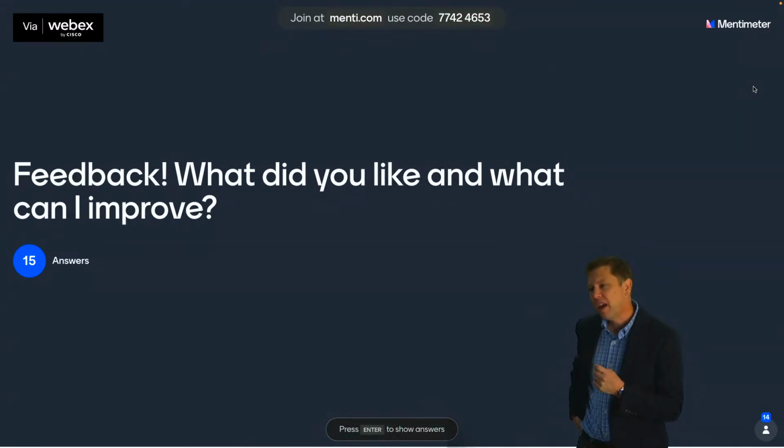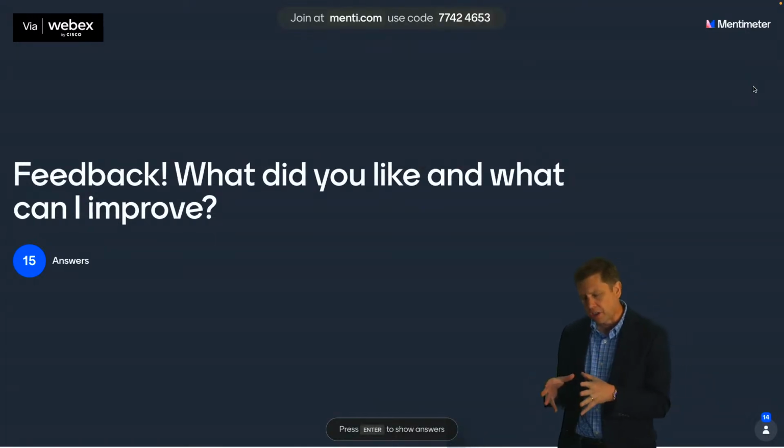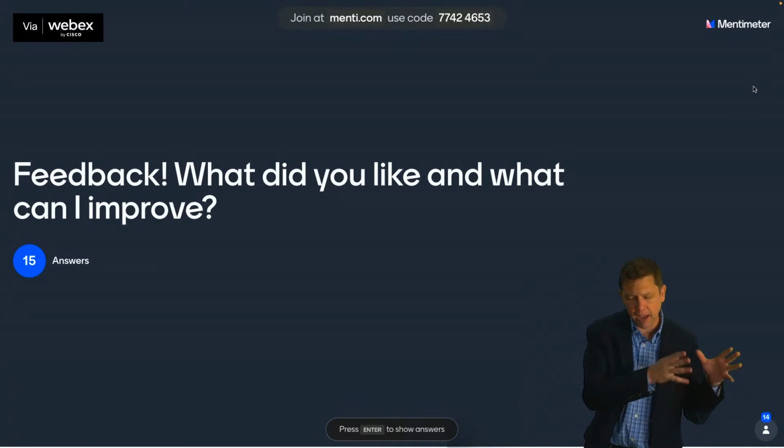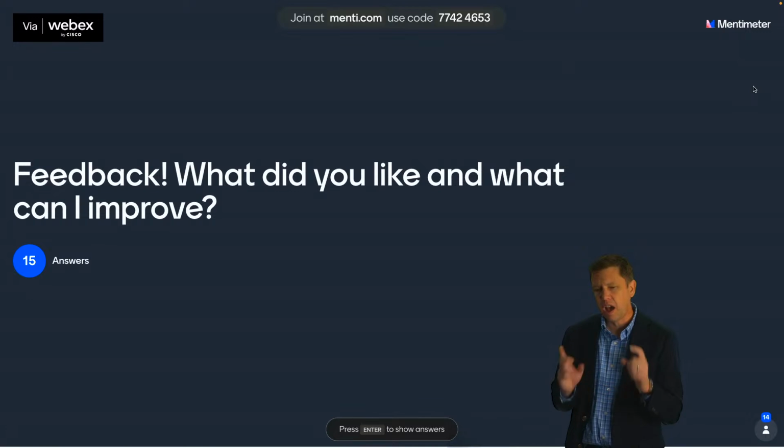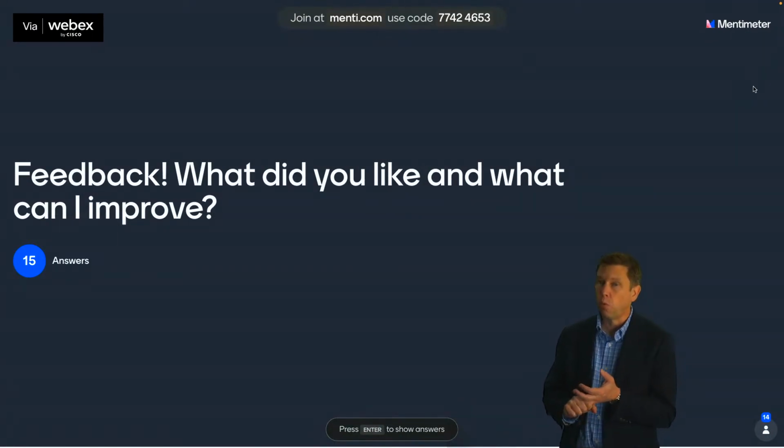Right. So let me give you some ideas. I was working on a project where they had rewritten a system, and it had to be exported out and then imported somewhere else. The cutover was very vital because it had to run fast, and it had to be right when they brought it back up. We had a window over a holiday weekend to do it, and if it wasn't back up, we were basically violating laws. Oh, yeah. So what we did with them is, I think we actually did the cutover every weekend for 20 weeks leading up to it.